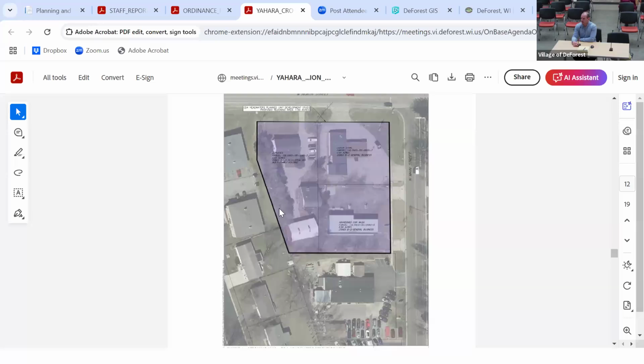We do have, the CDA, I should say, has a purchase agreement for the liquor store, which we're hoping to close on in May. The car wash property went through a condemnation process, which the CDA at this point has the authority to issue payment for. We haven't yet issued that payment, but certainly we've checked all the boxes for condemnation. And then the final property to the west, it's ongoing negotiations, and I'm anticipating that we will have an executable option to purchase at our March 13th meeting.